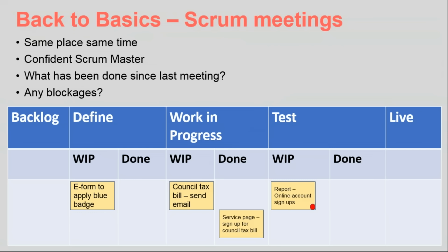So putting all our tasks on the board was really great for visualising who was doing what, and every post-it had a lead for the work and who was working on it, but also enabled us to see what capacity there was in the team as well, so we could pick up work from the backlog or the other stages on the board and move them through it more quickly.